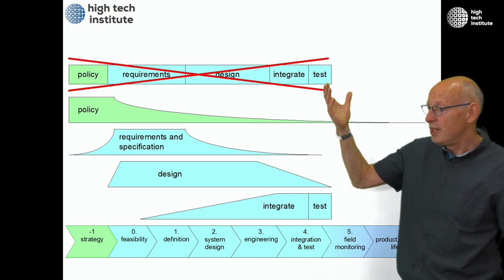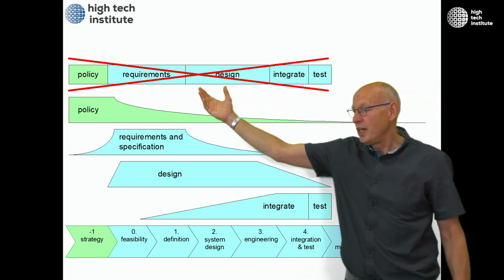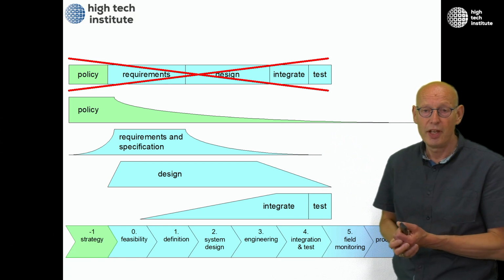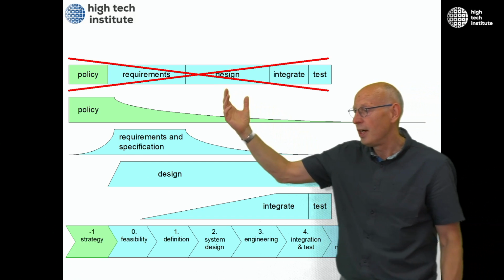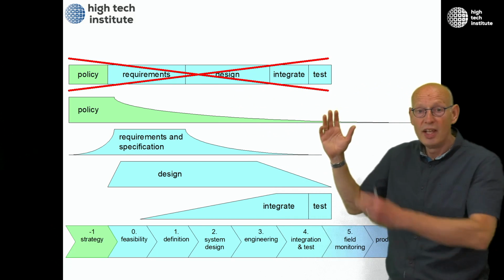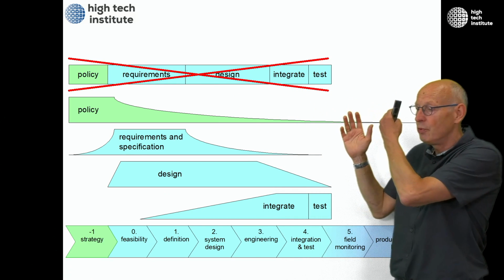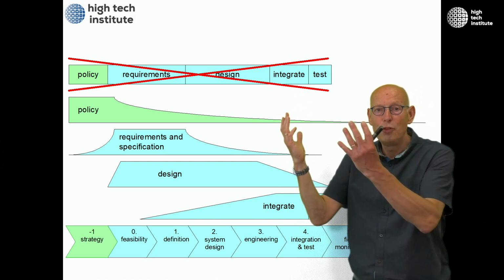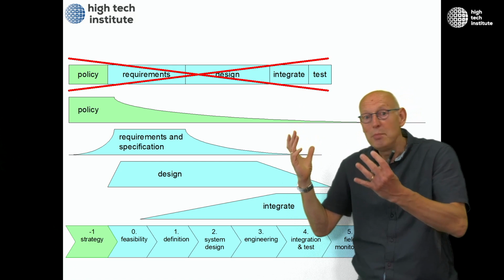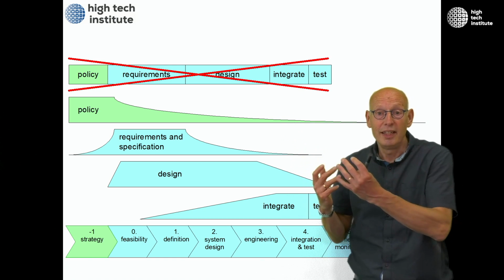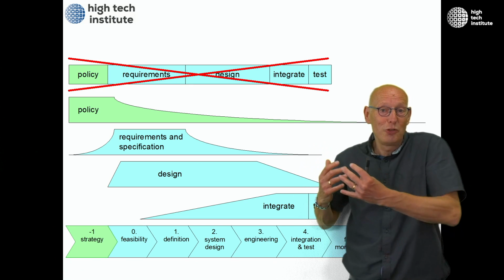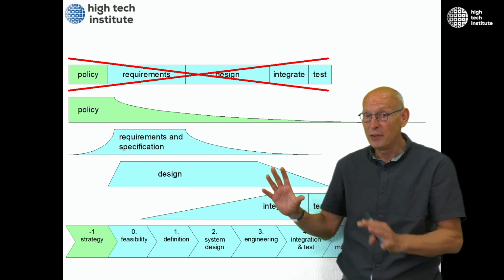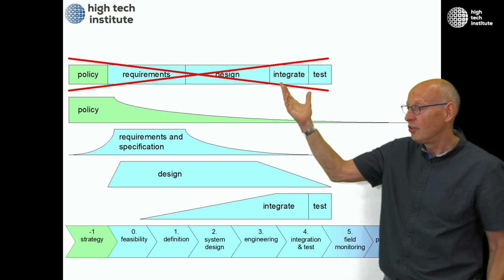As you might remember, typically the product creation process follows these steps. We have first feasibility, some needs and requirements, design, integration and test. And you can have that in a very stepwise approach. The most challenging part is the integration. That's where things come together and where we come to the conclusion that it may not fit mechanically, that electrical signals may not communicate in a correct way, that the software is not interacting well together, and that's typically coming up during this integration phase.